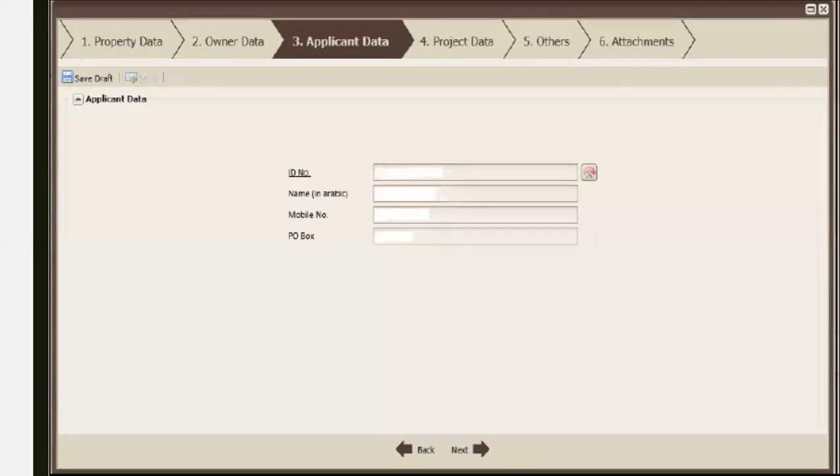As we'll see, for the process of submission, the QCDD certified engineer has to review and endorse all the submittals, confirming that, and signing all the drawings, confirming that all the requirements and all the QCDD regulations have been fulfilled within the design and the construction, and that it is reflected on the drawing. So it is a very important responsibility and task for the certified engineer.